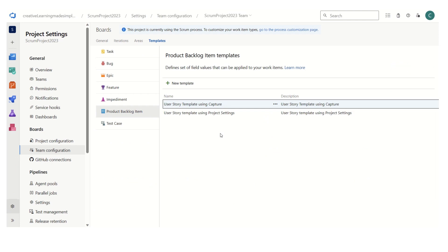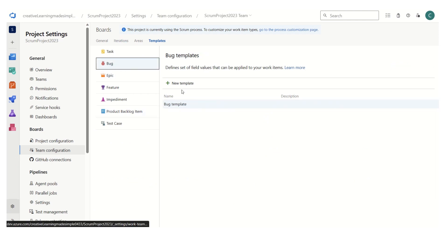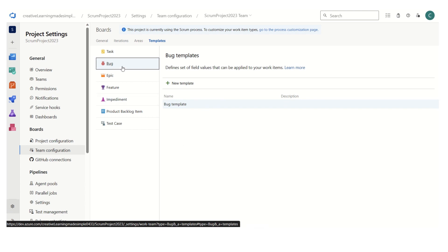Similarly, we can define templates for the bug as well using new template — we can pre-populate certain values. I already have a template defined, called the bug template. If I open and edit it, I have area ID, iteration, and I have also mentioned some steps, severity, system info, and the title.